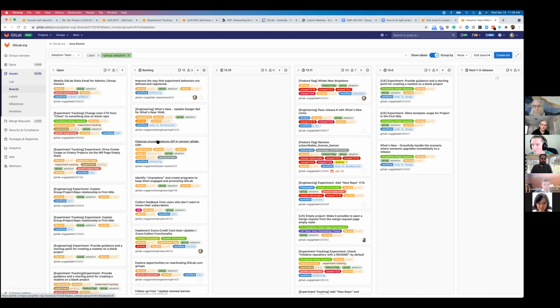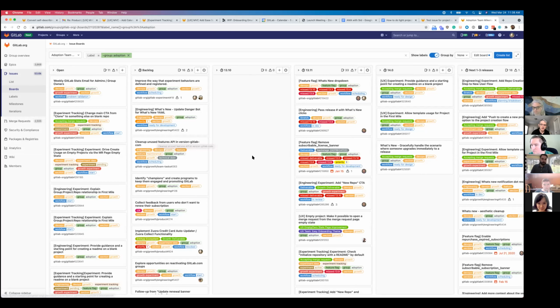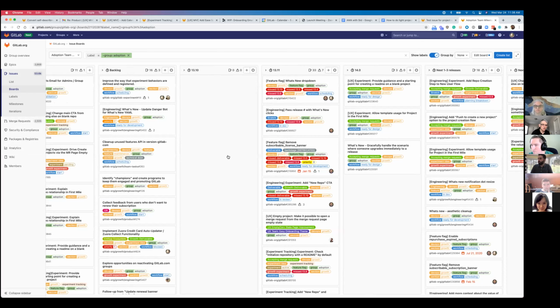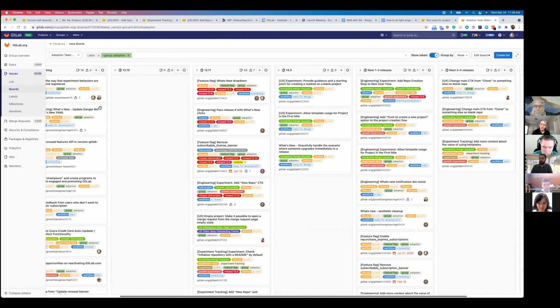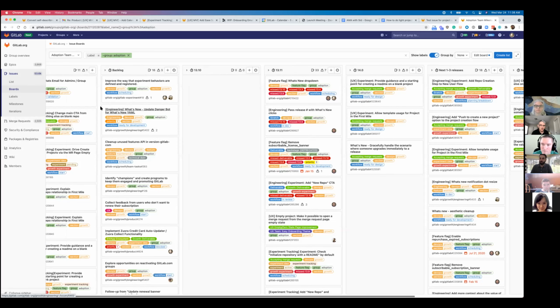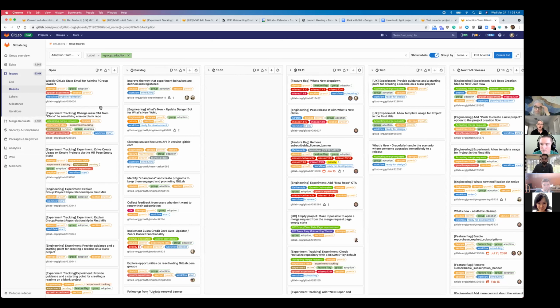And then it shows issues by milestone. You see milestones up there, and then it shows the labels. So it's showing milestone of backlog, 1310, 1311, et cetera. And those are draggable to set the order. So product managers or project managers, if you're doing project management, can drag things to say what's more important versus less important, so that when teams say, hey, go pick the next most important thing, the person, the DRI who decides that, can order the list so somebody can know what the next important thing is.